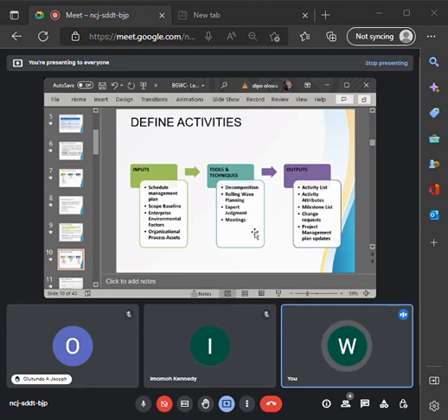You can see meeting is there, which means we can decide to have a meeting. Let's sit down and discuss it, everybody. Or you can decide to use expert judgment, look for somebody who has experience. Or we can decide to use rolling wave. I will explain rolling wave later as we move on. Now, what do we want to achieve? We want to achieve an activity list, activity attributes, and milestone list, and possibly make a change request.